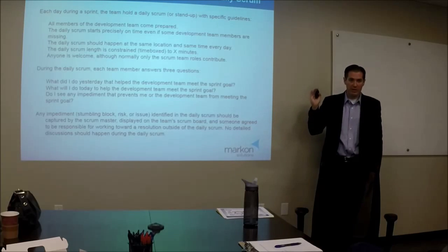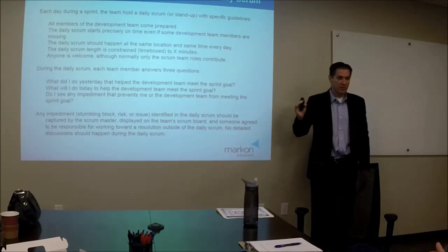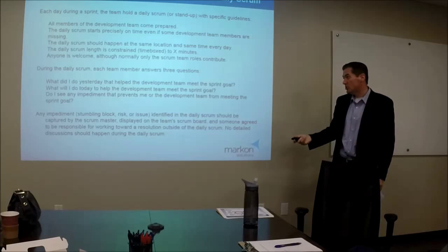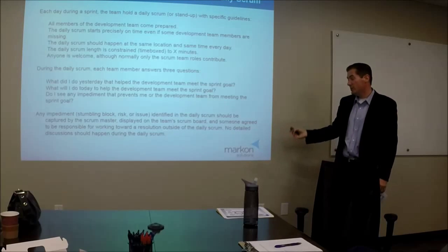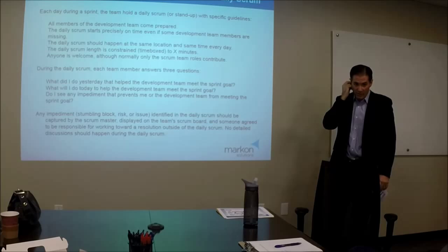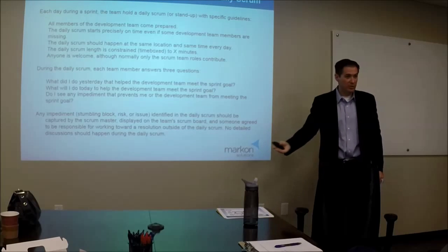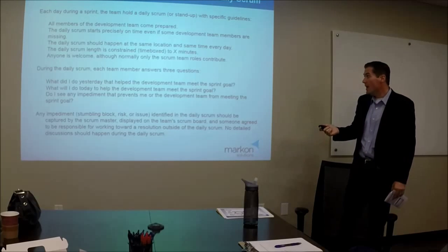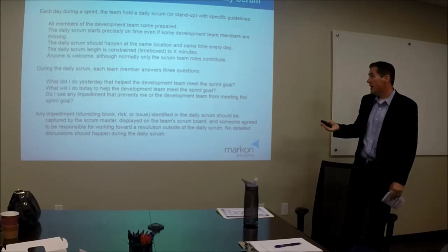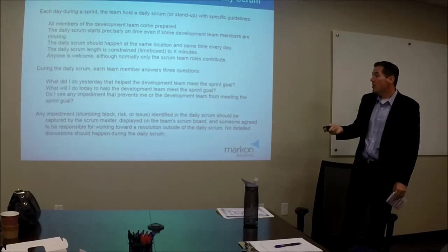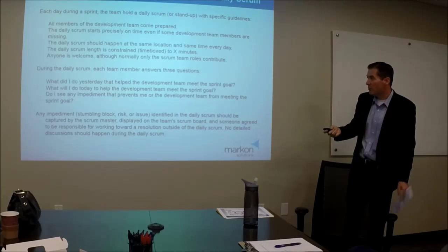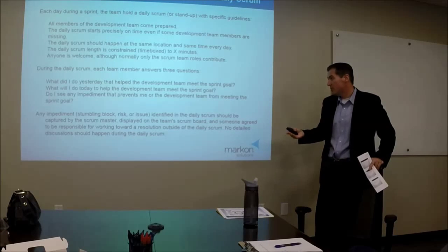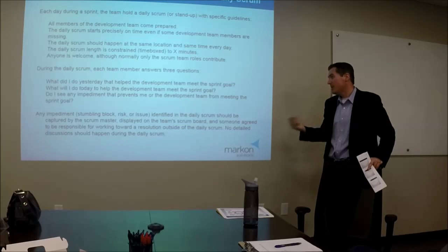You go around the table, you can only say, what did you do yesterday? What are you going to do today? What are your impediments? It's the Scrum Master's job to remove impediments. So when someone says, well, I would be doing this, but, that's the Scrum Master's job. Okay, well, let me fix that for you so you can get on with your work. Same location every day. This is general principle stuff, but they say anyone is welcome, but usually it's only Scrum team members. That's about it for this slide.